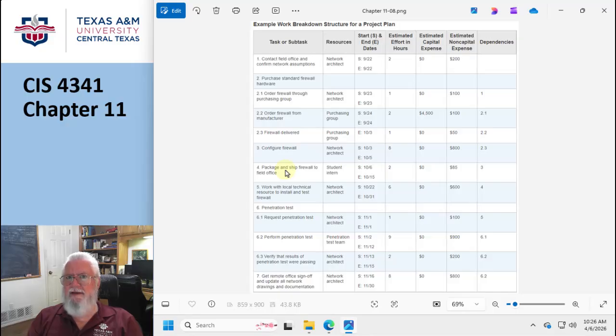How long does this thing take? Now, obviously, I can manipulate that. I can put more people against something to squish the dates together. Or in some cases, if I know there's going to be a delay because the roof ain't going to be here yet, well, maybe I'll do the opposite. I'll steal a couple of carpenters from this job and put them over here, and that'll stretch this one out, but the other one gets contracted, right? Just a pool.